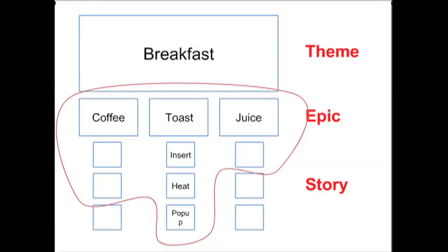As opposed to if you had 1 or 2, that means if you don't do 1, you only did 50% of the ones you committed to. If you have only 1 and do none, you did 0. So it's a nice size for us to say, for a 2-week iteration, let's break it down to the level so the team can commit to 4 to 6 stories.